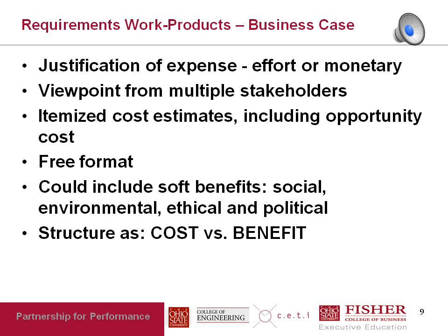And in the benefit section, you have the value that will be generated by this system. Now, at this time in the life cycle of the product, it is unlikely that people will have a clear idea of either the cost or a specific idea of the value. So the idea here is to capture it at a high level. And as the project evolves and you understand better what to build and what that system will do for you, you refine both the cost parts of it as well as the benefits part of it.